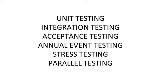We did additional testing where the TAPIS property tax system is basically an annual billing system. And so we took images of the annual cycle, saved those off, and used them as test beds for additional testing. So we could basically capture key activities that occurred throughout the year.